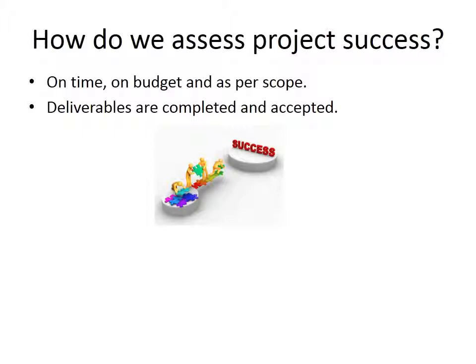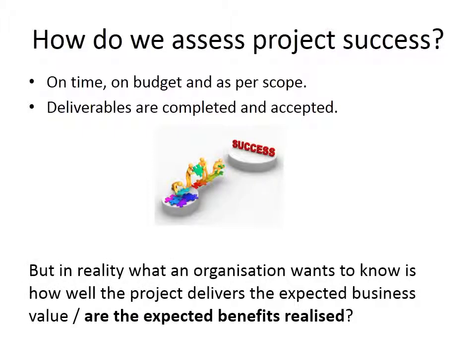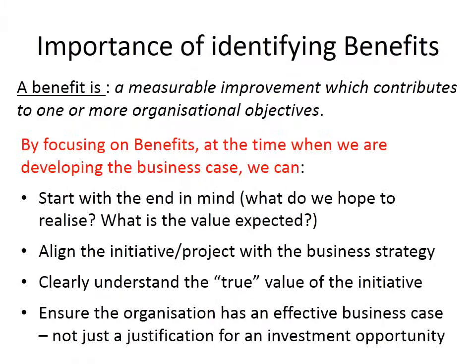But is that enough? The problem is, what the organization really wants is: are we delivering the value? Have we realized the expected benefits that we set out to achieve when we raised this initiative? If it's not in the business case, there's no way at the completion of the project, post-project also, to really assess if you have actually realized the benefit. So that's why it is critical and important to identify those benefits right from the start, and set the target for all the stakeholders, for the project manager, for the business sponsor, for all the people that will be involved in developing and working on the project.